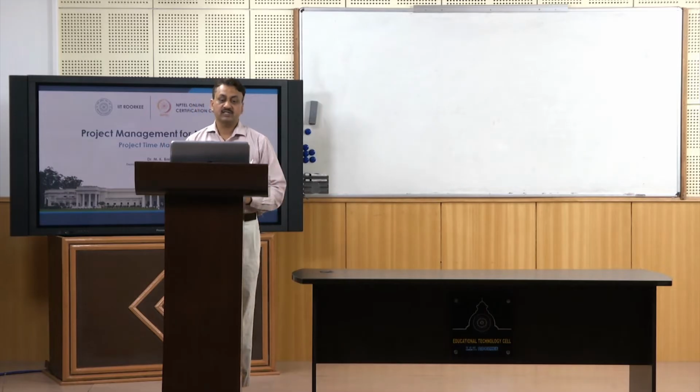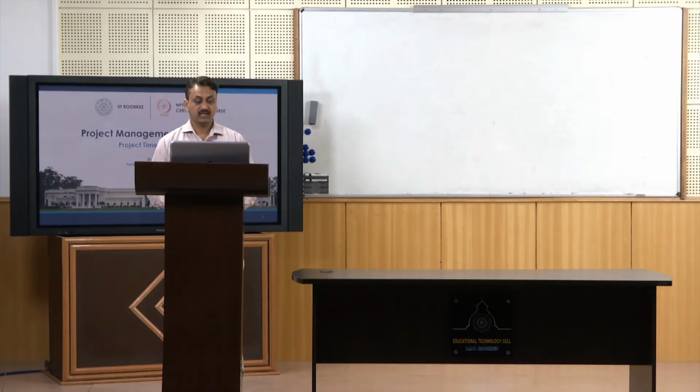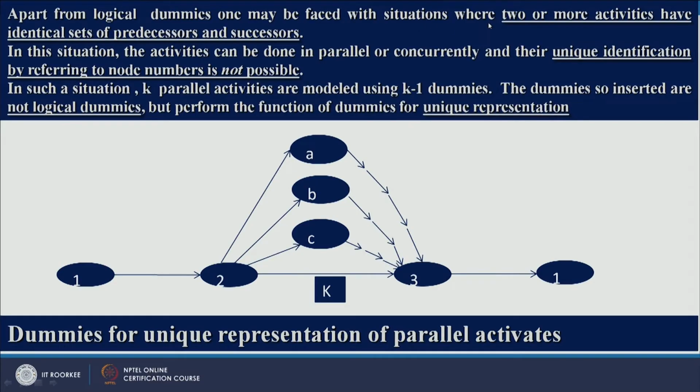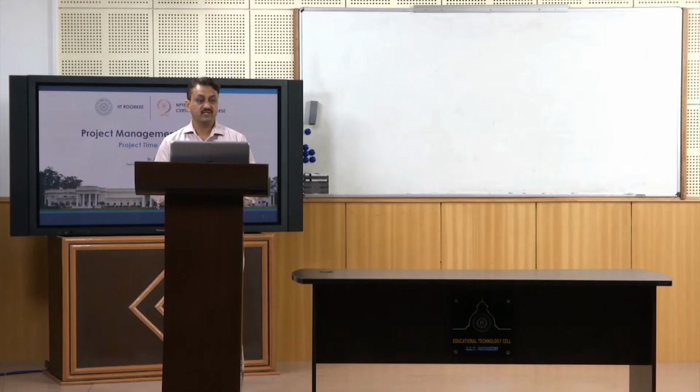Now apart from the logical dummy activity, you have one more type of dummy activity. We use dummy activities for unique representation of parallel activities. Apart from logical dummies, one may be faced with a situation where 2 or more activities have identical sets of predecessors and successors.